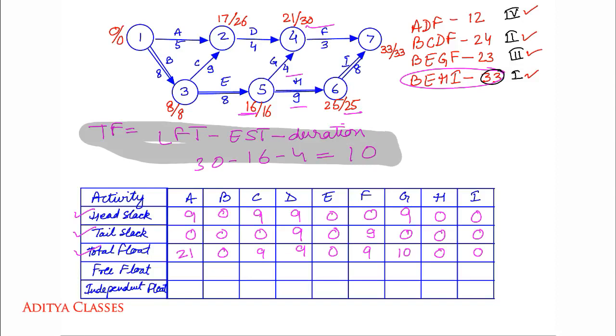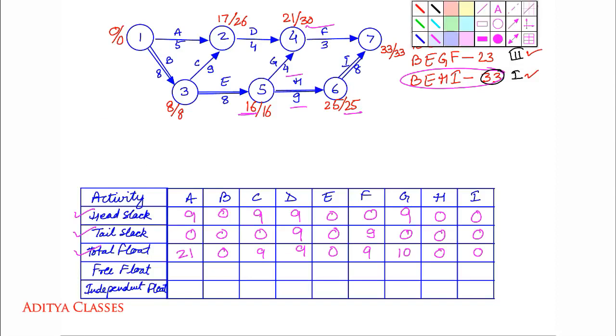So now that we have head slack done, tail slack done, total float done, now we have very simple formula for free float and independent float. Free float equals total float minus head slack. And independent float equals free float minus tail slack. For A: free float is 21 minus 9, giving 12. Independent float is 12 minus 0, which is 12. We can just run through them, applying the formulas. We are getting some negative independent floats.